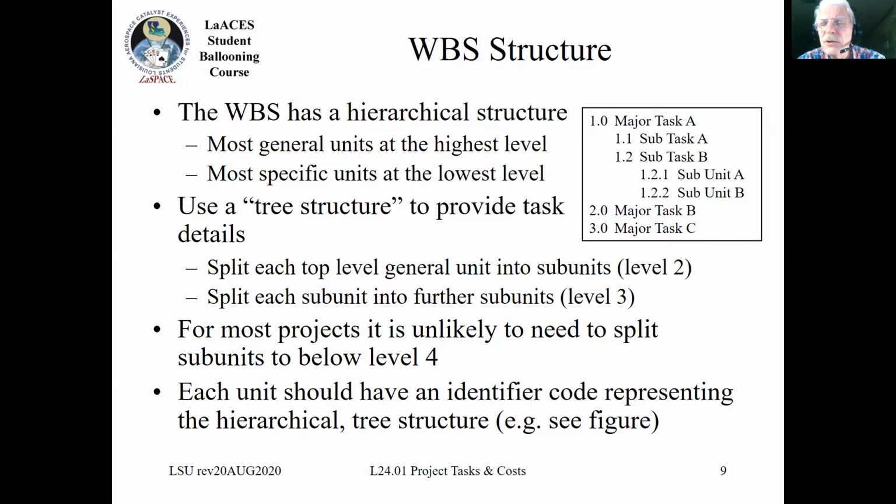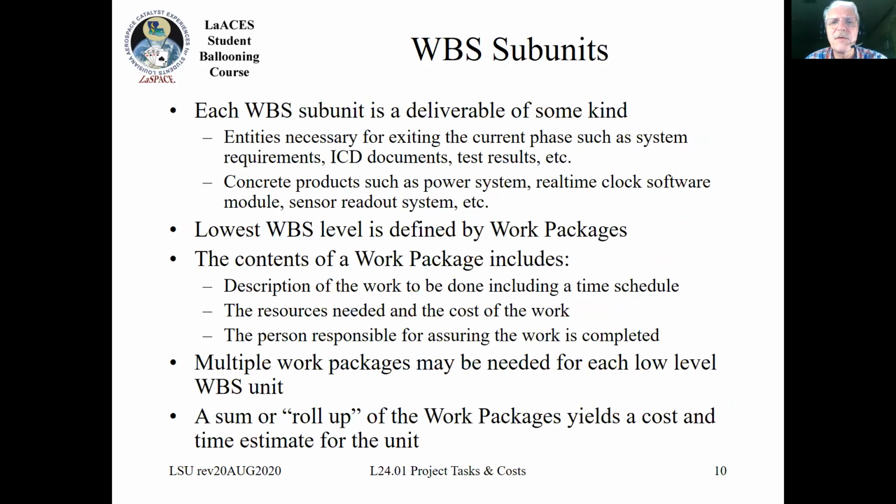So usually you don't need to go down that low, and sometimes even level 3 is sufficient, depending upon how complex your project is. Notice that there is a way in which the identifier is constructed. So 1.2.1, that's the general convention for how you identify those numbers.